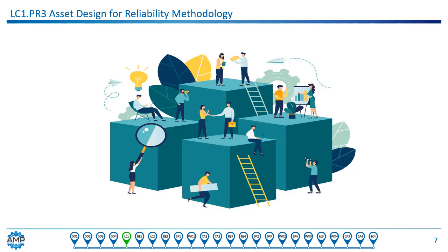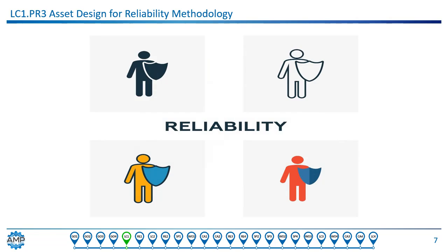For critical systems, asset acquisition projects should include a technology review to ensure the best asset condition monitoring capabilities are realized during asset operation. These reviews should be formal, using some governance process to ensure that nothing is missed. Things you want to check for are things like maintainability, the ability to access and maintain the components of the asset for maintenance and monitoring.